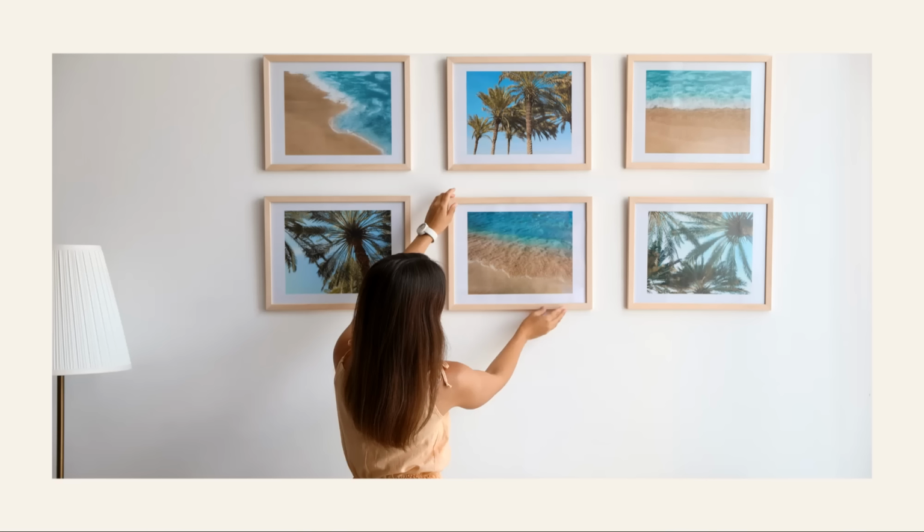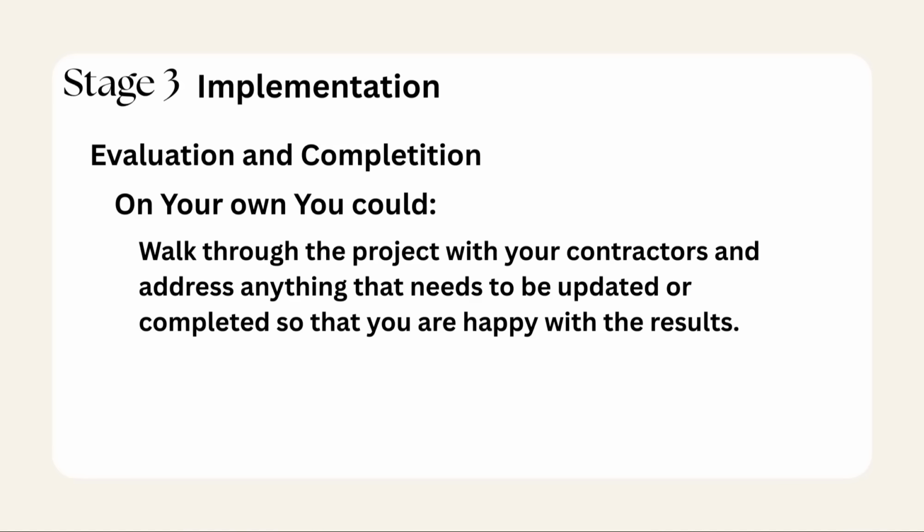In fact, a contractor may walk through with the client and the designer and create what's called a punch list, a list of things that need to be changed or addressed before we can button up everything and call this project complete. And this is where the designer would do some last minute touch-up styling. So maybe adjusting the throw pillows on the sofa, or making sure a picture is hung straight. But most importantly, they would be there with the client to make sure the client is very happy with how everything turned out. And you would do the same.